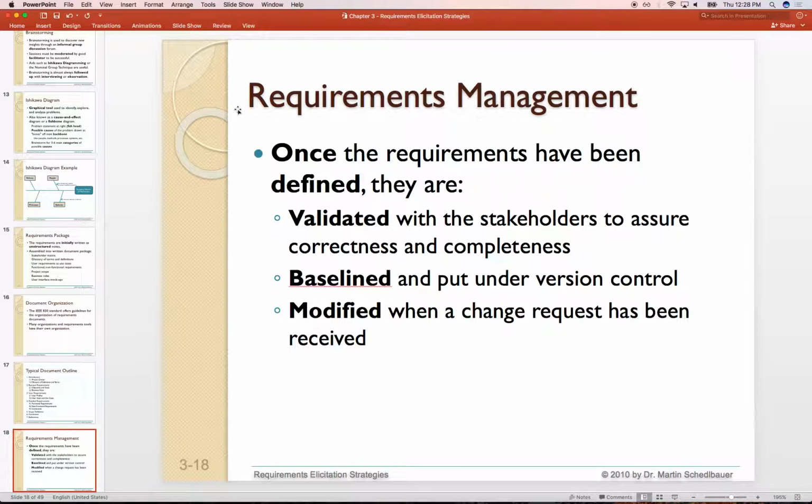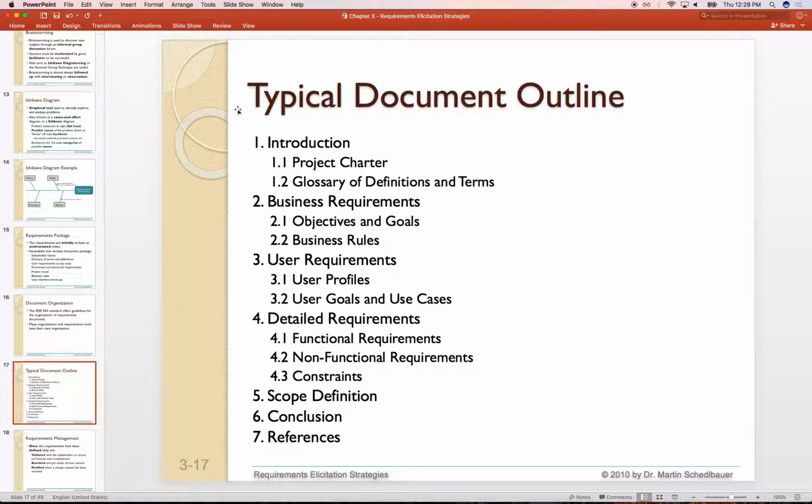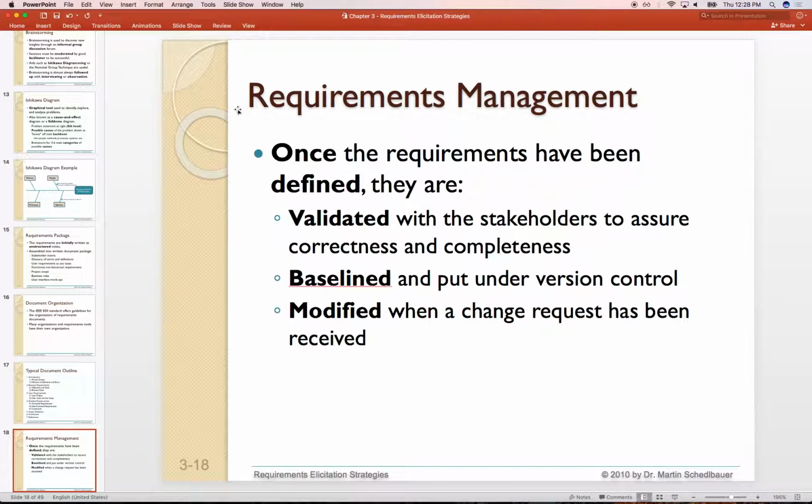Once we have come up with these requirements, we do accept that it's a living document, that there will be modifications, but there will be an accepted process for modifying this document. We know what the original baseline requirements were, and some of the estimates and priorities at that particular time, with the understanding that they will be modified. There's no point in working much more on some of these requirements because we know they might change, and we're all open-minded that this will change.